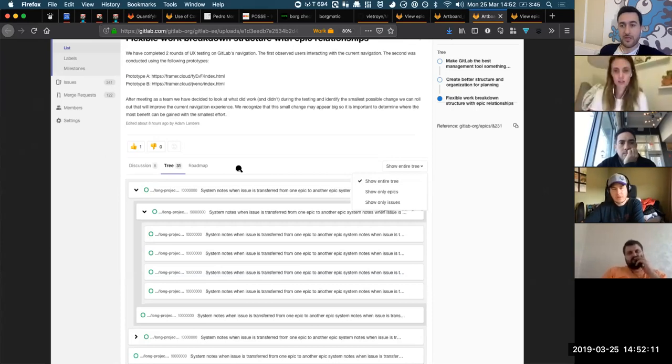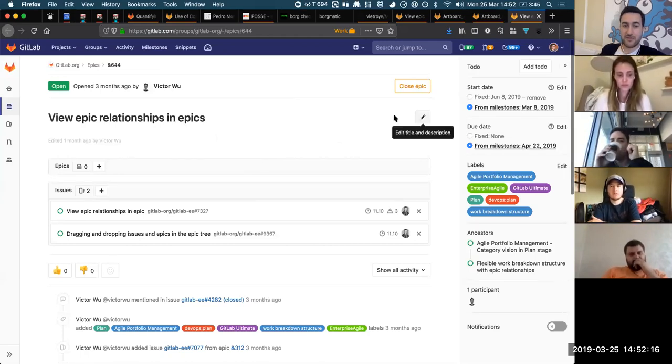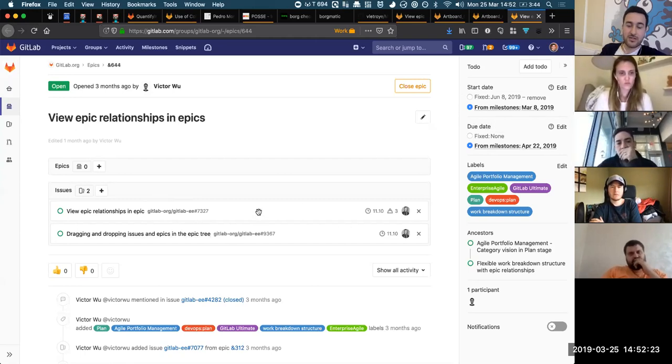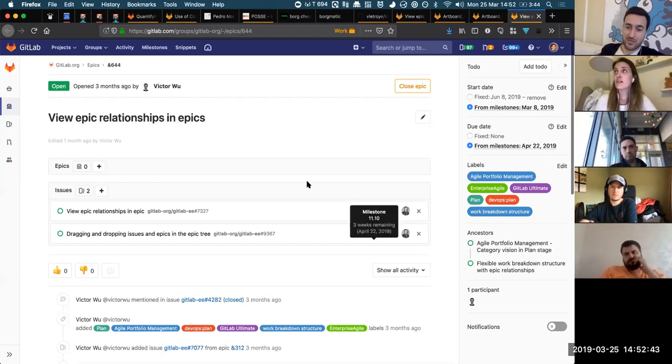Sure. So in this example here of this epic, we have a start date and due date that are based on the milestones of the issues that are contained within. So you can see that in this case, both issues are using the same milestone. So it's through 3 weeks remaining, it's April, and that's why we have April here, right? And you can see when hovering that it's the same milestone that we're inheriting this due date. And in this case, we're also inheriting the start date because it's the only milestone here.